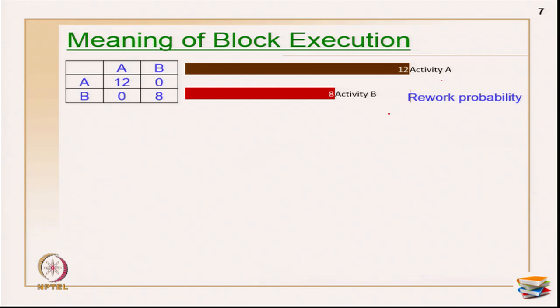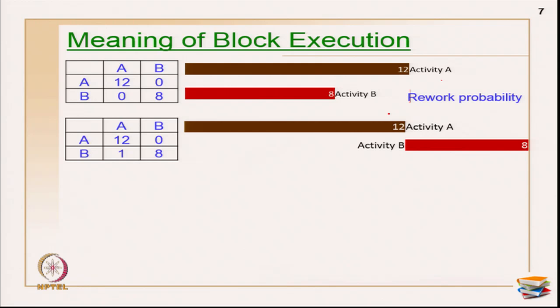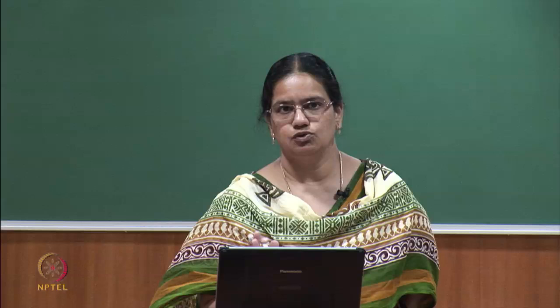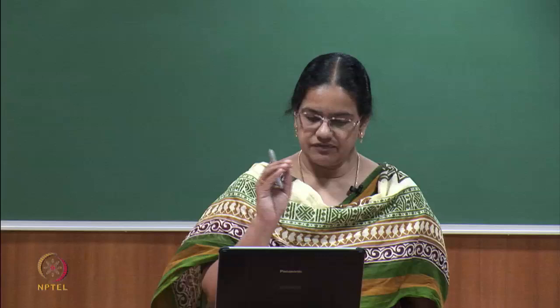Now I will explain rework probability with another case. I have taken the same example but used a value of 1 here - this X mark originally implies there is a relationship from A to B, and I am replacing this X value with a rework probability value of 1. As a result of any change in A, there is 100% probability that B will repeat. Every time you make some change in A, B will definitely repeat because I have a 100% probability value.